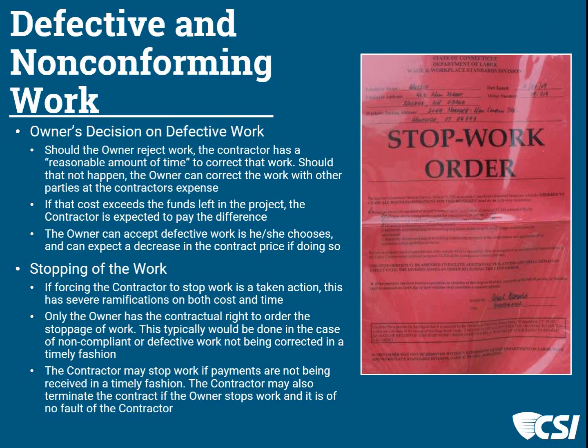They will often look to the architect or engineer for guidance, and this step would typically be taken in the case of something that was egregiously defective or non-compliant and wasn't being corrected in a timely fashion. My experience with stop work has been more about quality of performance, not quality of the installed product, where contractors were perhaps overwhelmed and behind and not meeting critical milestones, and the owner stepped in to say, stop, that's it. This is non-conforming because it's off schedule, and I'm going to go another route to try to finish the job.